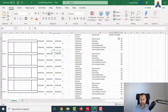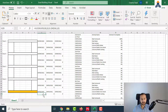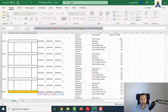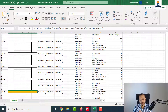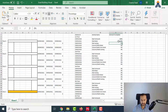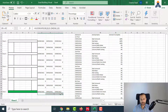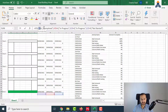Let's do one test. Here for the activity percentage complete, if it is 100% for the slab formwork, the VLOOKUP takes the value from the coded activity ID. Based on the text and the IFS formula, it shows me 'in progress' - because only one activity is complete but not casting. If the rebar is also 100%, it is still orange/in progress. But if I make the casting complete too, it changes to green because all are 100% - this is the first test we run in IFS. If it is completed, everything is completed, and this is how I can show the color on the sketch.